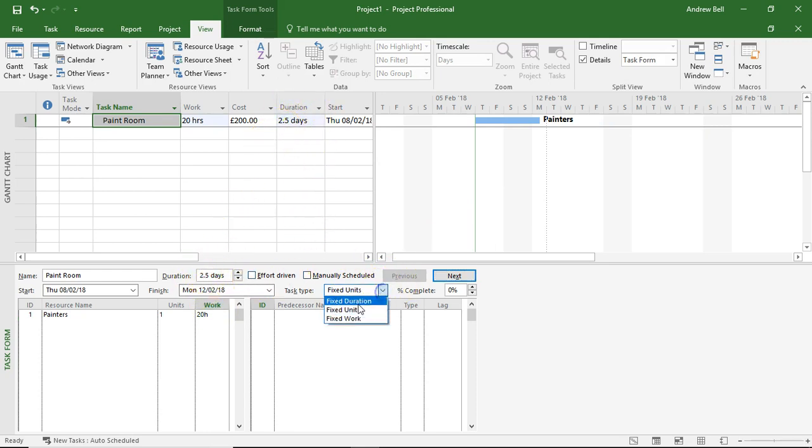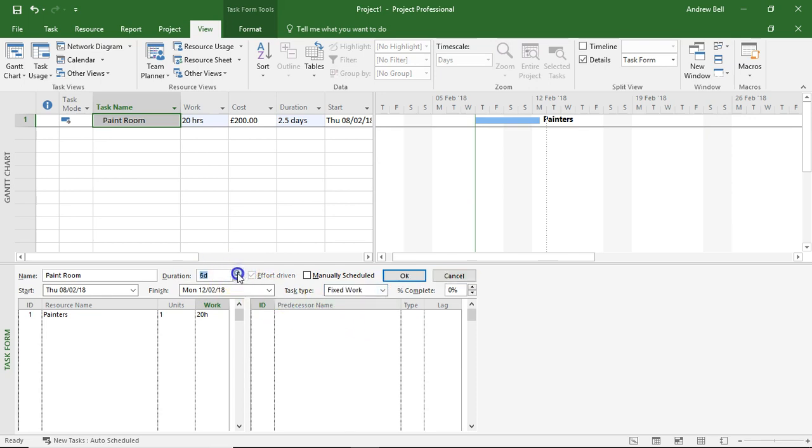I'm now going to fix the work at 20 hours and I'm going to increase the duration to five days. And this has given me the result I want.